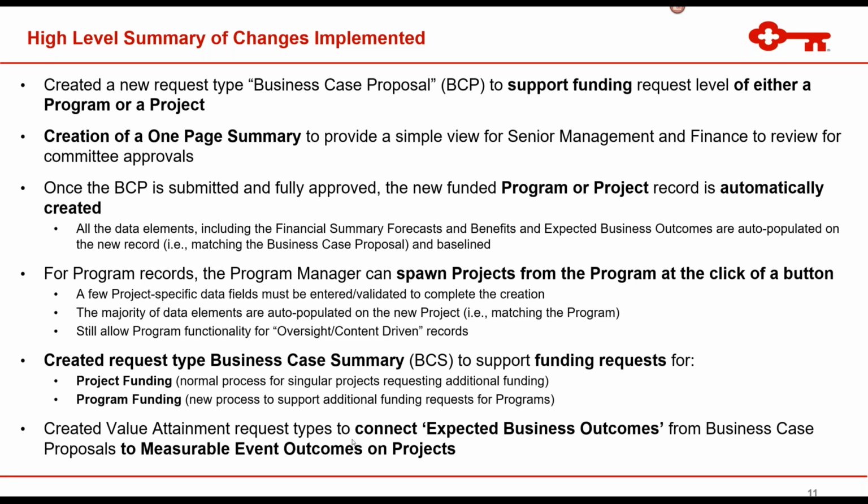Not all of the data for the program is going to be applicable to the project, so we have decided which fields and which data points get carried over. But those projects then are auto-populated with the data. So a few project-specific data fields must be entered or validated to complete the creation.